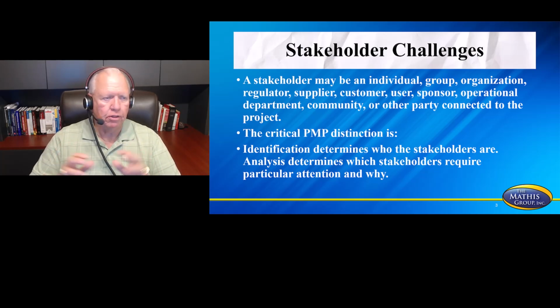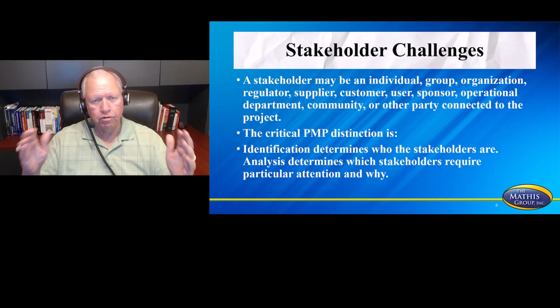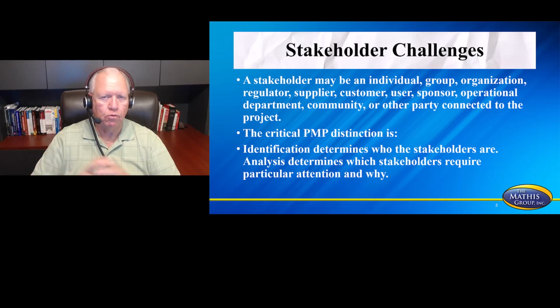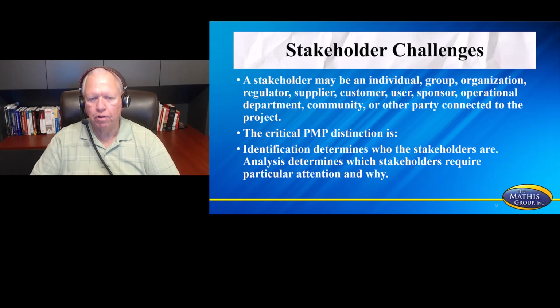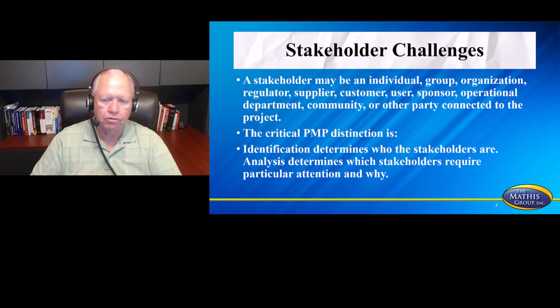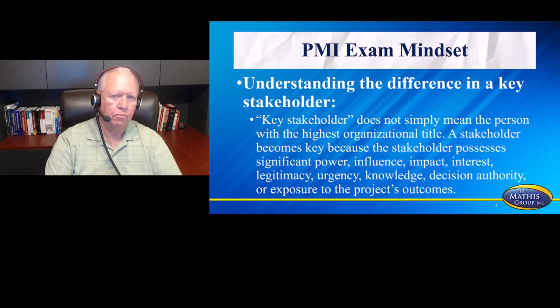I want you to see this because sometimes people will mistakenly assume that a stakeholder is just the team, or just the team and the sponsor. But you'll notice that PMI has a very broad sense of what a stakeholder is. The critical PMP distinction is that identification determines who the stakeholders are, and analysis determines which stakeholders require particular attention and why.